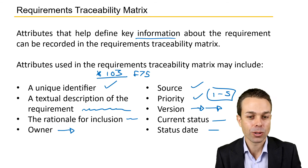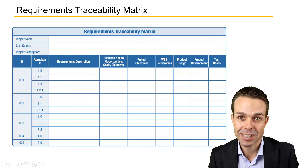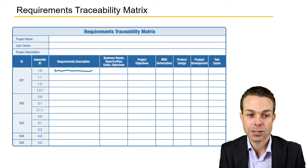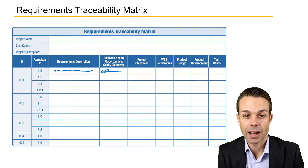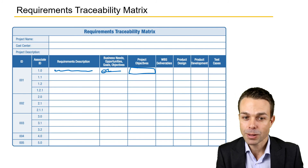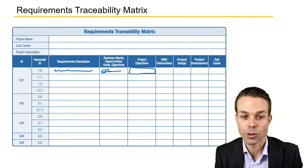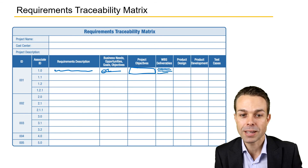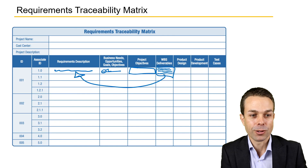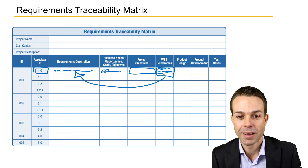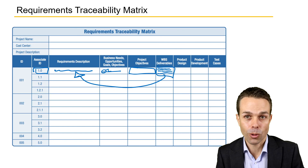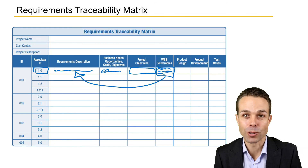When looking at that, we also need to match it to the deliverables, as you'll see in the example directly from the PMBOK Guide. You've got your requirements description matched to the objective — exactly what we want — and the project objectives overall, to make sure we're still moving in the same direction. But ultimately the WBS, or Work Breakdown Structure deliverables — those smaller pieces of work — identify the actual deliverable that is going to deliver that requirement. You can see the unique identifier used, and that way the customer and stakeholders can all see how that particular deliverable adds the value they wanted in the first place.